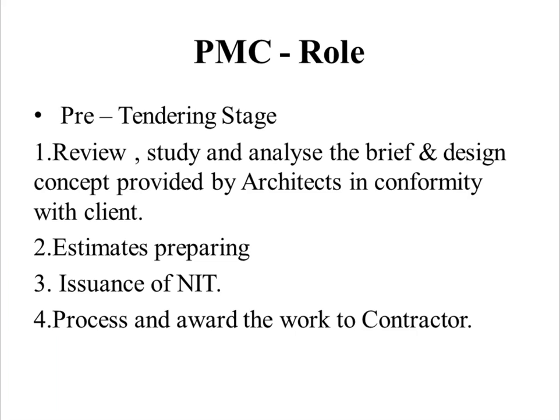Next is the PMC role. Now the project management consultant role can be done in various stages. The first stage can be the pre-tendering stage. So in the pre-tendering stage, what is the role of PMC, that is project management consultants? They need to review, study and analyze the brief and design concept provided by the architects in conformity with the client.